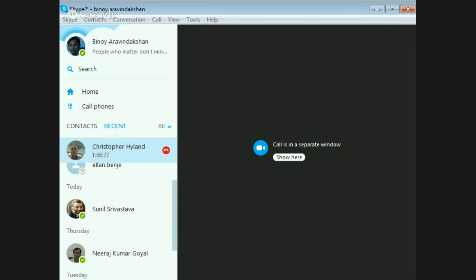Yeah. If it's something like a realignment request, it is the employer's responsibility. If it is aborted work because the client has changed his mind too late, again, it's the client that should pay.